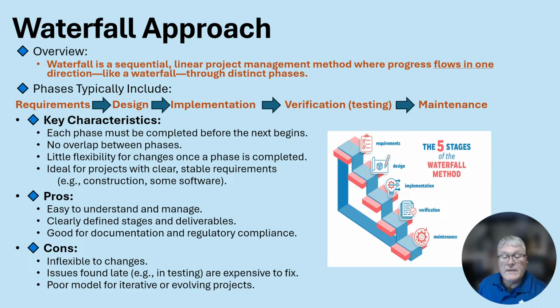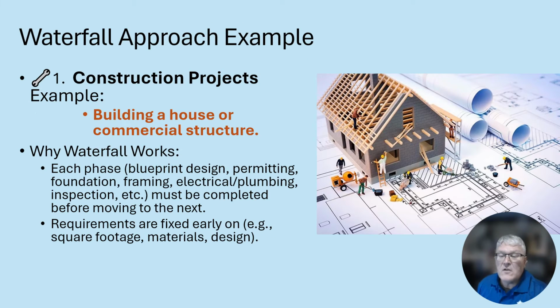The pros: it's easy to understand and manage. It has clearly defined stages and deliverables. It's good for documentation and regulatory compliance. The cons are it's not very flexible for change. Issues are often found later and they are expensive to fix afterwards. And it's a poor model for iterative or evolving approaches. In the following slides, I will provide you examples of waterfall approach projects.